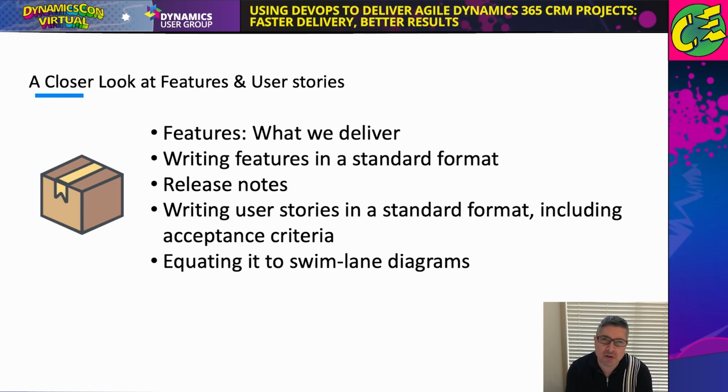User stories also follow a standard format where the user stories begin with "need to ..." The full way we write them is "As a, I need to, because," and the acceptance criteria is written "given, when, then." As a, and we want to know the job title of the person doing something. That helps us with planning security down the road.